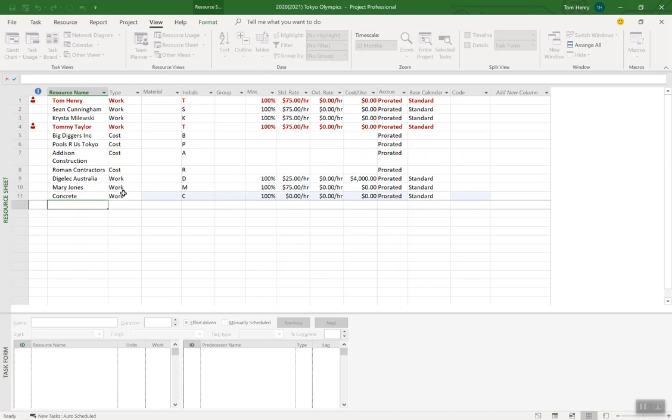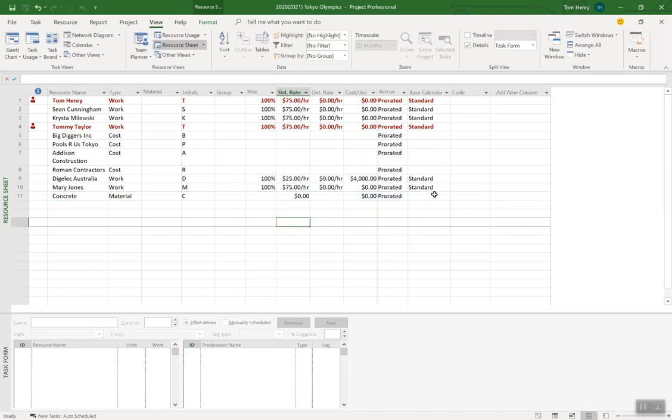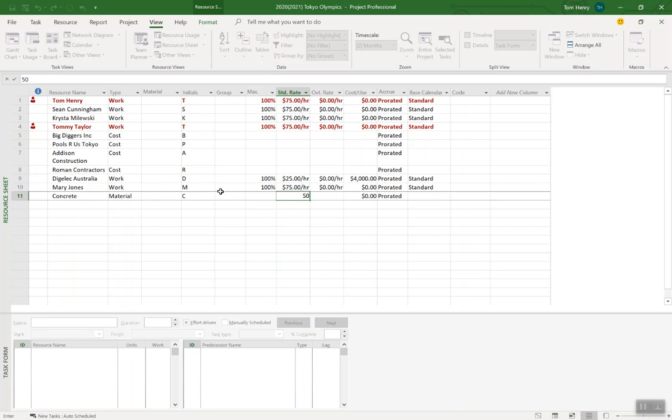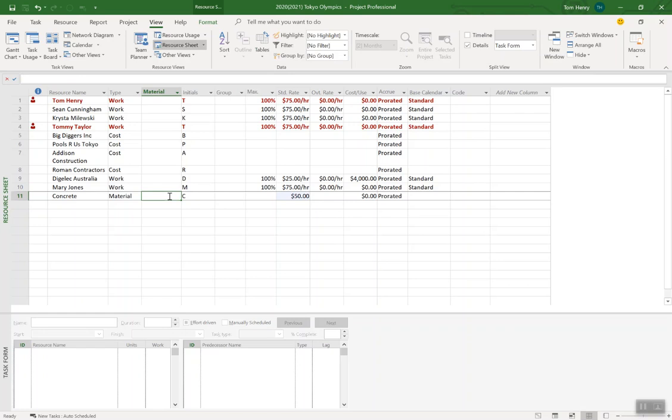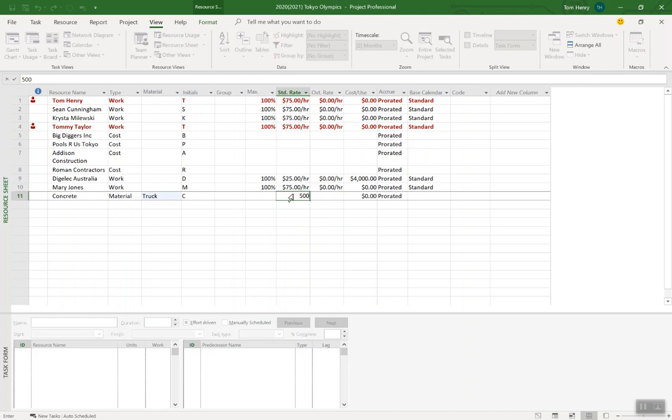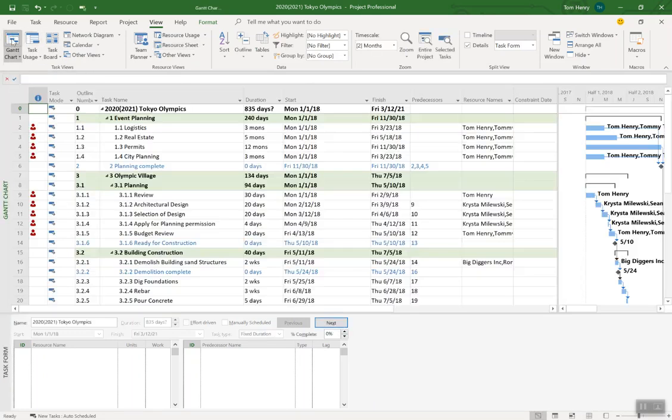I'm going to need some concrete on my project, material label here and you'll notice that I can specify how much I charge. I'm going to say I will charge fifty dollars per, let's say truck, right, so a truck of concrete. Fill that up in practice that's a bit generous, make it five hundred. So every time you have a truck it cost us five hundred dollars. All right, so without drilling into that too much I want to now come back and start assigning my resources.